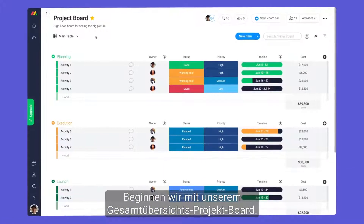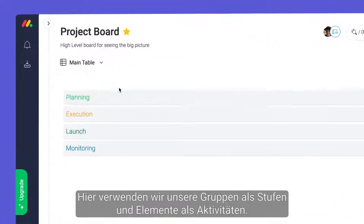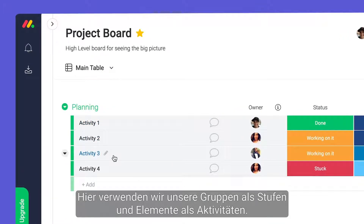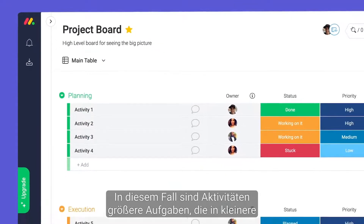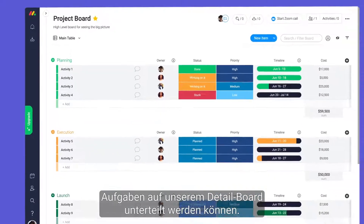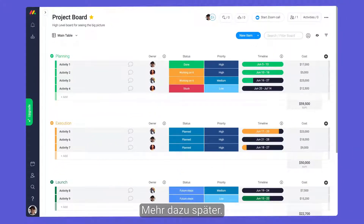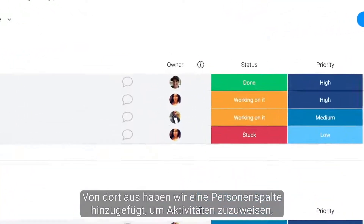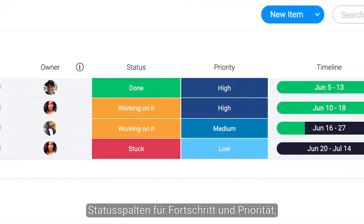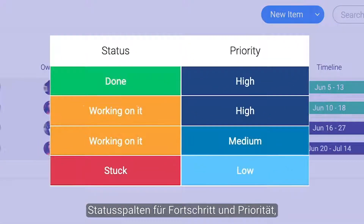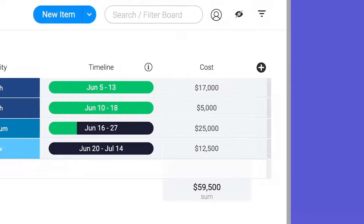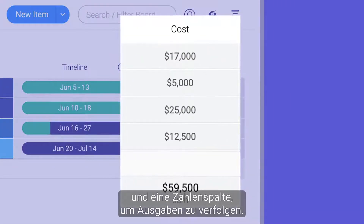Let's start with our high-level project board. Here, we're using our groups as stages and items as activities. Activities are larger tasks that can be broken down into smaller tasks on our low-level board. From there, we've added a people column for assigning activities, status columns for progress and priority, a timeline column to manage deadlines, and a numbers column for tracking expenses.